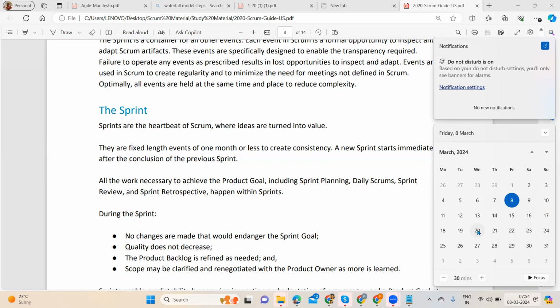So we will not do that. What we will do is close the sprint and then start the new sprint. The 2 remaining user stories, based upon the discussions, will be moved to the next sprint. Or if those are low priority, sometimes we can also move them to the backlog. Okay.